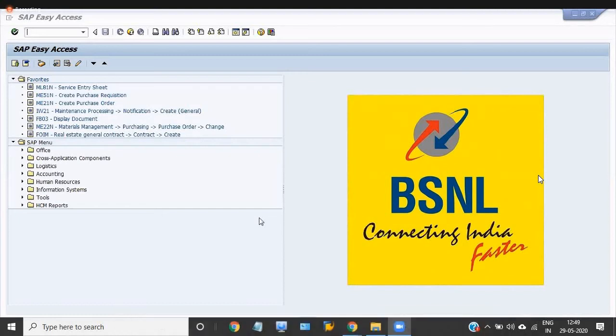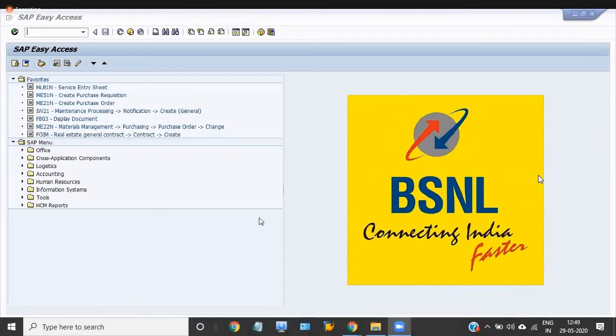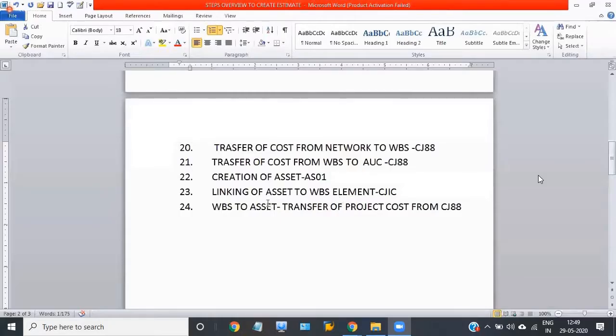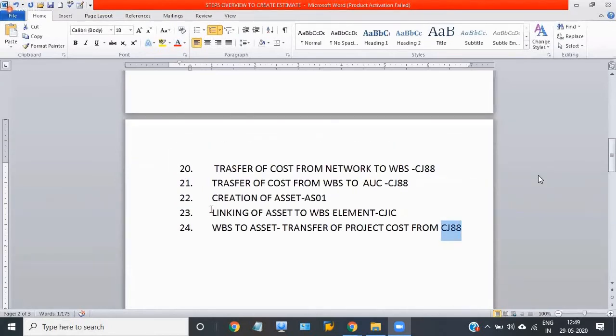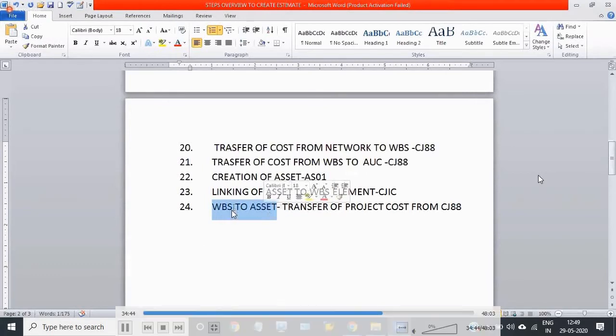Hi friends, welcome to the ERP SAP team channel. Today I'm going to discuss the last step of the capitalization: the full and final settlement of the WBS into assets. This means transferring the cost of the whole WBS into the final asset. Until now, the actual cost is in the asset under construction. This step is WBS to asset, the transfer of the project cost from CJTA to main asset.